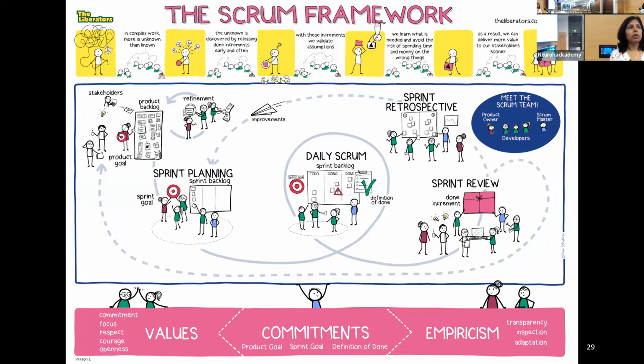So if any one of you is an expert on this, I might be saying something that is not by the book, but the way I would do this in a 5-day hackathon is instead of days, I would use hours for those Fibonacci estimates. So I'll be like, okay, that's going to take me an hour to do. That's going to take me 5 hours to do. That's going to take me 40 hours to do. That's the whole week, so you cannot be taking on anything else. It helps you understand whether the scope of what you're about to do is going to fit in the time that you have through that hackathon period.